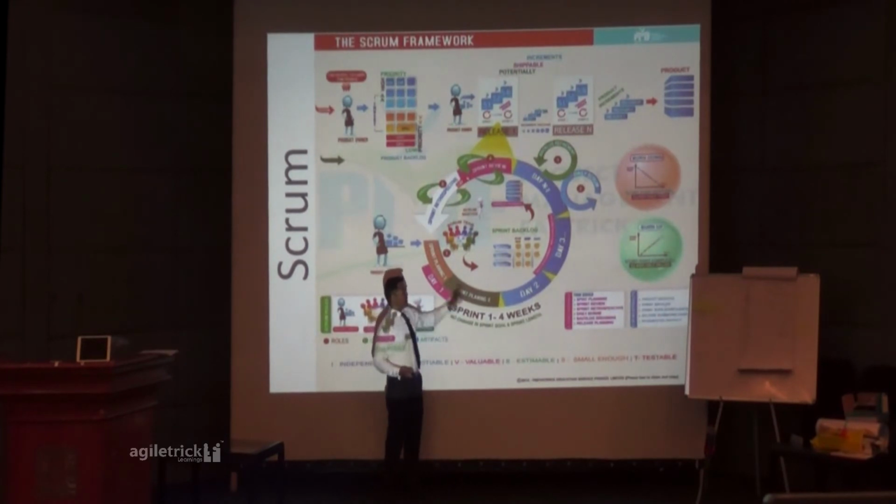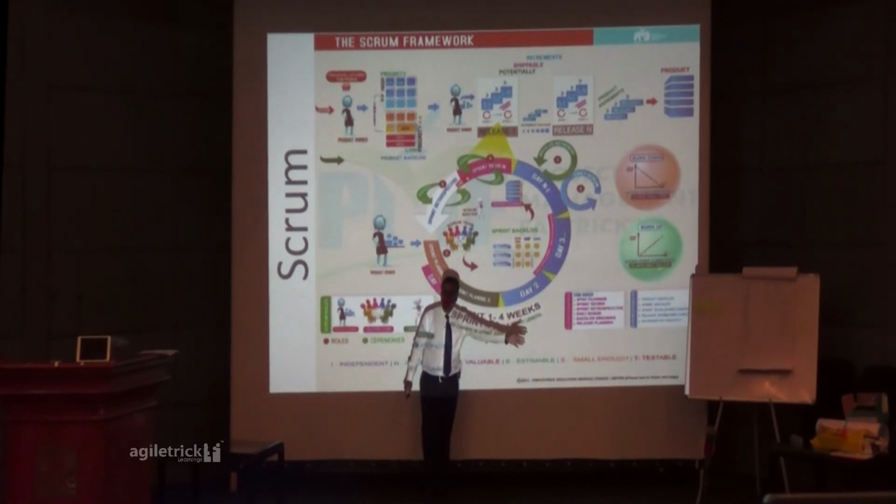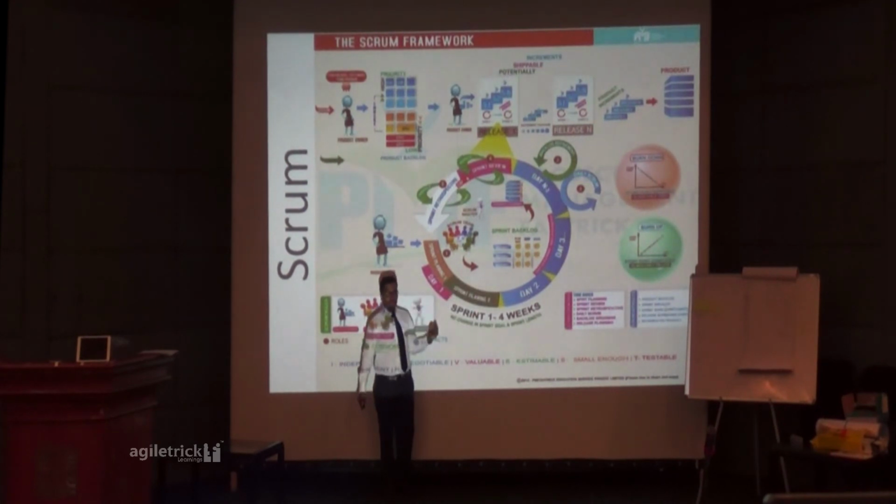But who is the leader here? Here the product owner was the leader. And who estimates? No, the Scrum Master is not estimating. The Scrum Master is just facilitating this meeting. It is you, as the development team, who estimates how many hours it should take. Yes or no? Team, are you with me? So here I consumed 100 and 150, so I still have capacity. It means I can even go and pull another story.